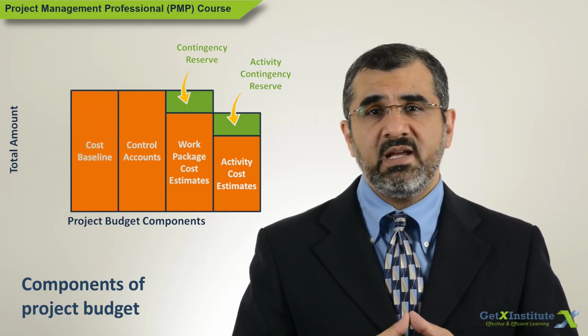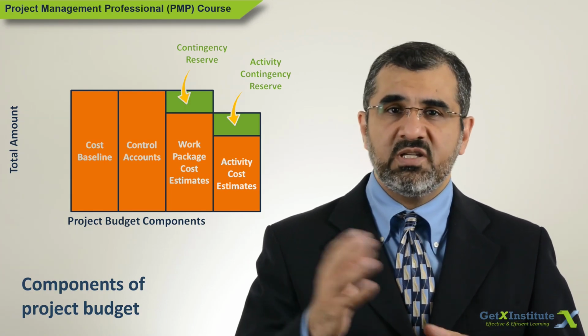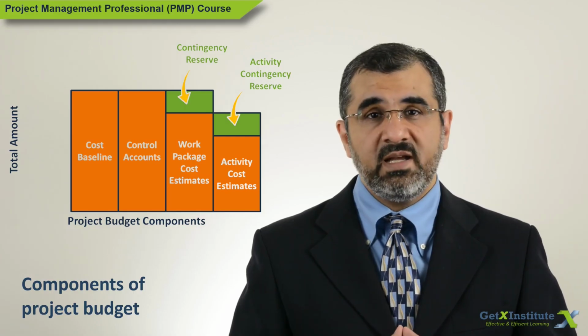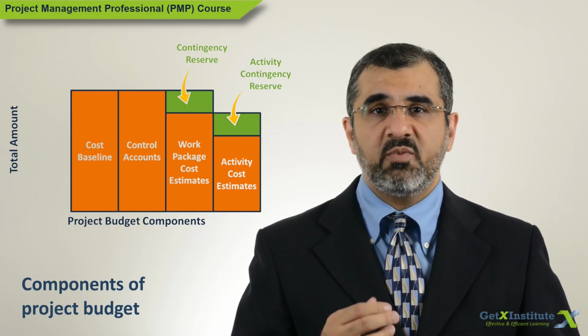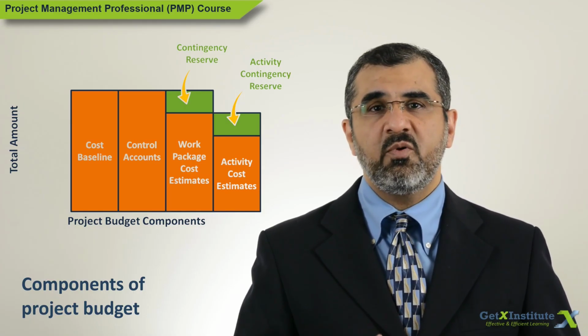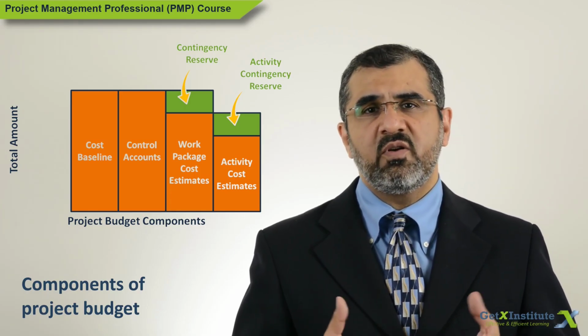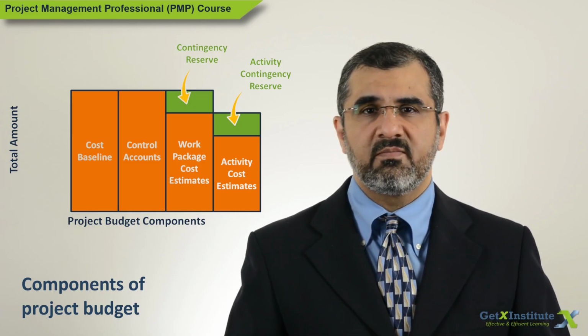The cost baseline is what is given to the project manager to spend on the project. The cost baseline will be used to track the project's progress and report whether the project is on track cost-wise, or is it over budget or under budget.